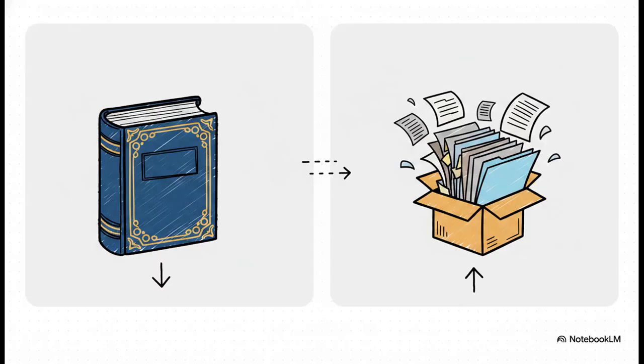Now, there's a really critical distinction here, and honestly, this trips up a lot of professionals. There is a huge difference between the project management plan and project documents. Your daily project documents, the stuff the team creates just to manage the day-to-day work, those are simply artifacts. They're just records of the work. You maintain them, you archive them, but they are not components of the overarching management plan itself. The plan is your rulebook. The documents are just the game tape. So definitely don't try to cram every single meeting note into your master plan.